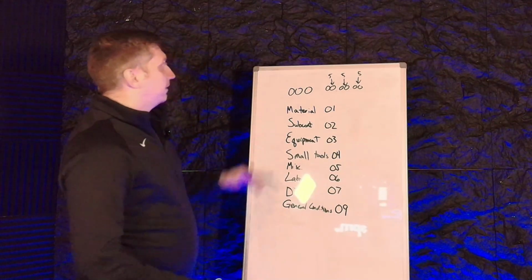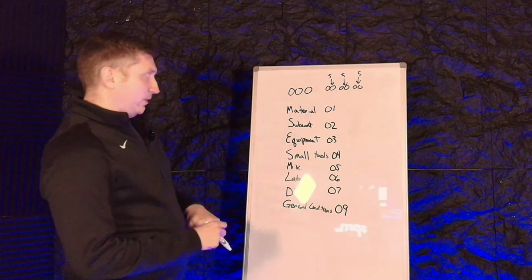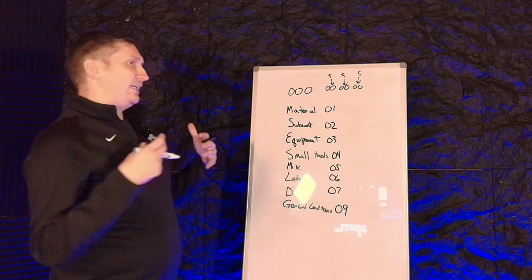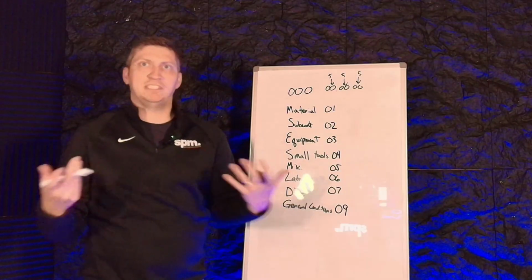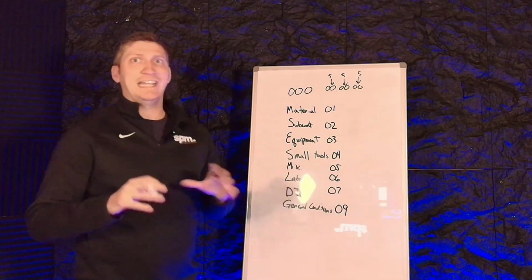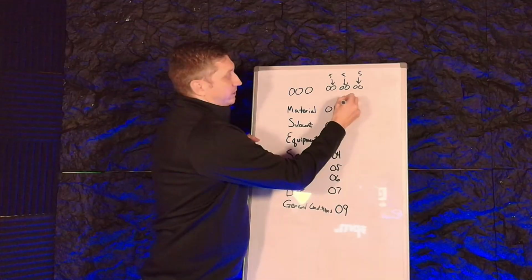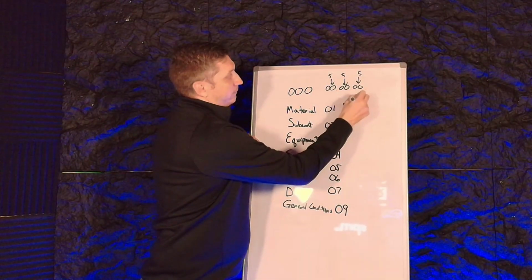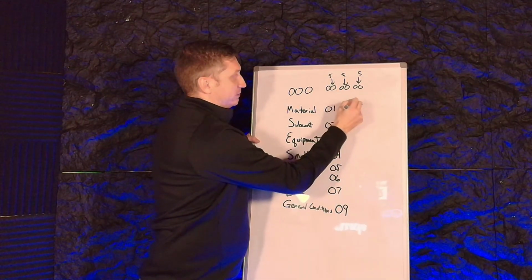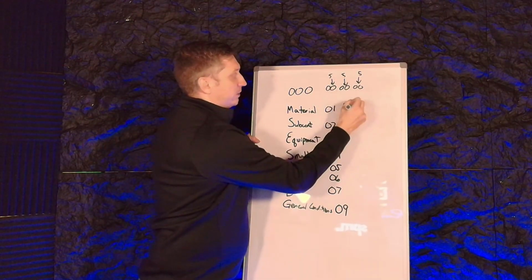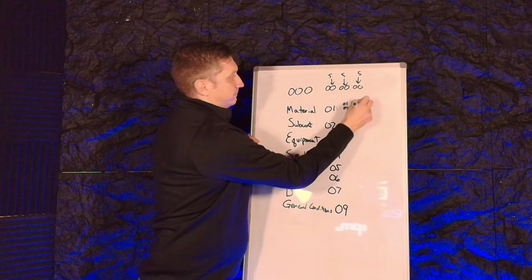That's fun. Okay, so then we get to the second code. This is going to be types of material, types of subcontractors. And that makes more sense. If I'm going to buy rock, I'm going to have 01 rock. I'm going to write this really small, so I'm sorry if you can't see it. 02, that's going to be concrete structures.